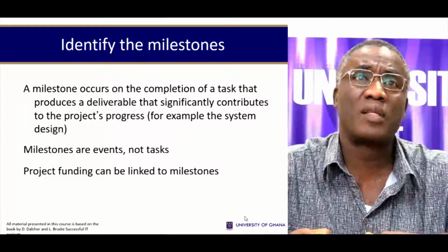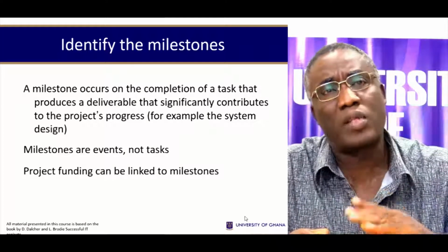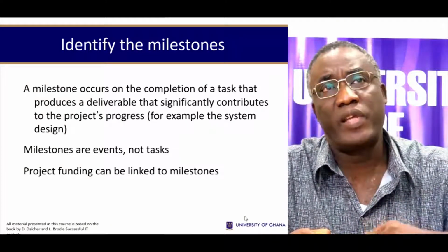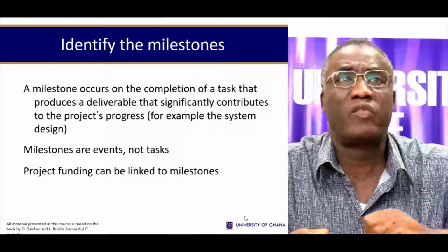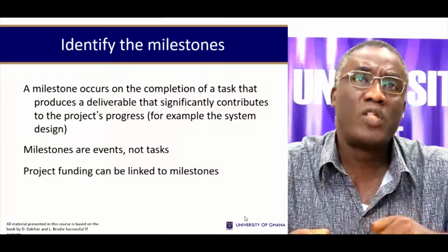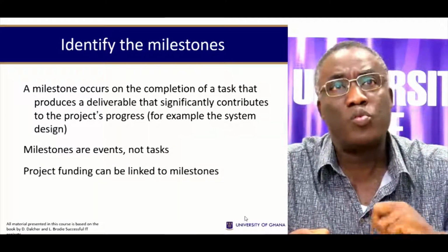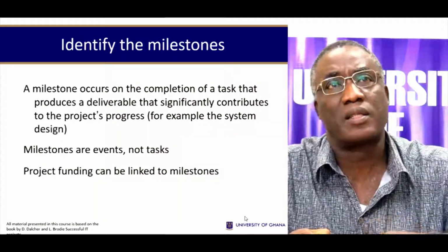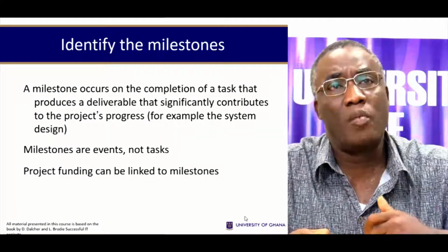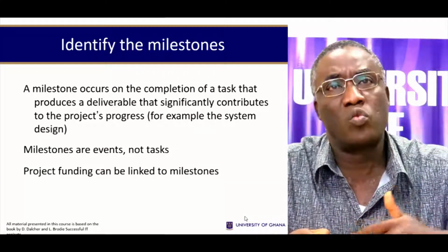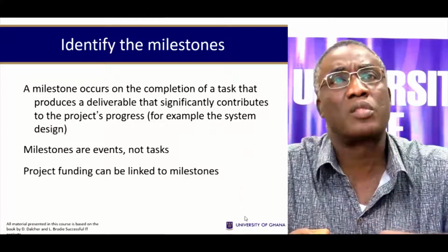What are milestones? As opposed to tasks, milestones are events. They occur on the completion of a task that produces a deliverable, which would significantly contribute to the project's success. And normally, project fundings are linked to milestones, that's delivering those milestones.